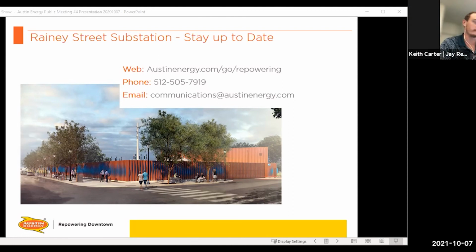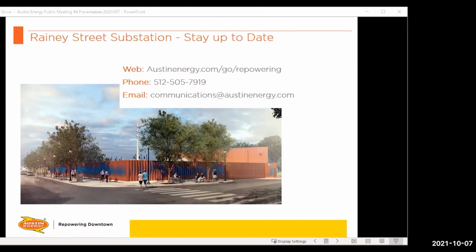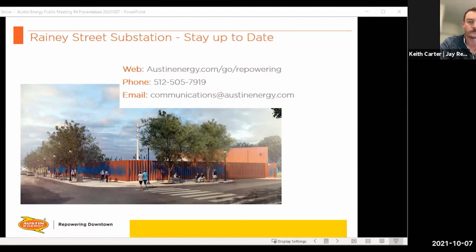Yeah, so the way we've drafted our schedule and phased the work on site should allow us to park almost all company vehicles, subcontractors, et cetera, on site. If there was any overflow, then they would just have to use the public parking on the streets. But we phased this job to hopefully eliminate that as much as possible, because it's already so busy in that area that ideally almost everybody would be able to park on site.